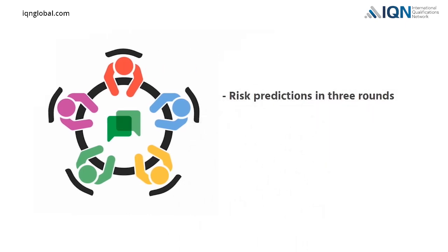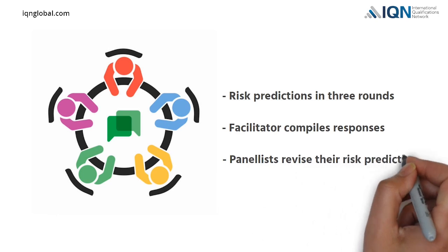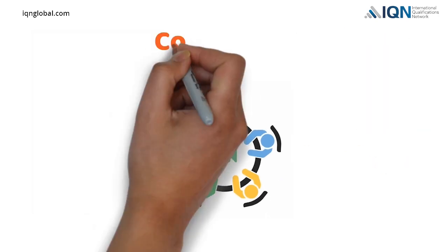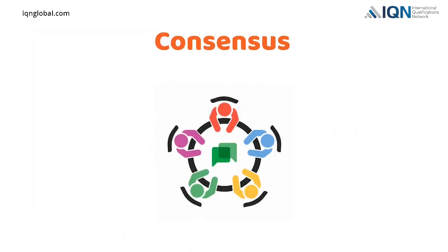After each round, a facilitator compiles responses and shares them with the panelists. Then, the panelists revise their risk predictions in light of the new information. This process continues until there is consensus among the group of experts regarding potential project risks.